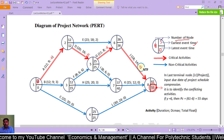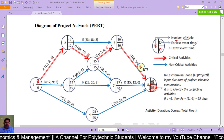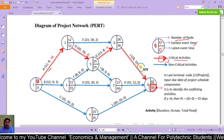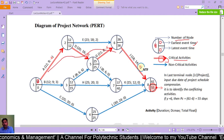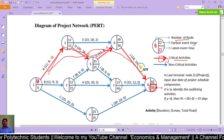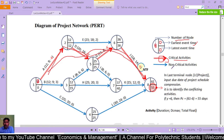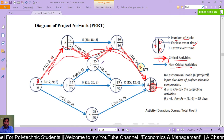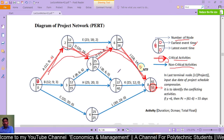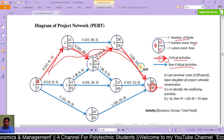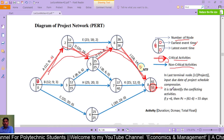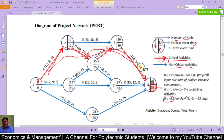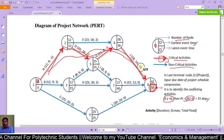This is the earliest event time and this is the latest event time. This is the critical activity. In the last terminal nodes, input the due date of the project for scheduled comparison, and it identifies the conflicting activity. This is the project completion time, which is the due date.